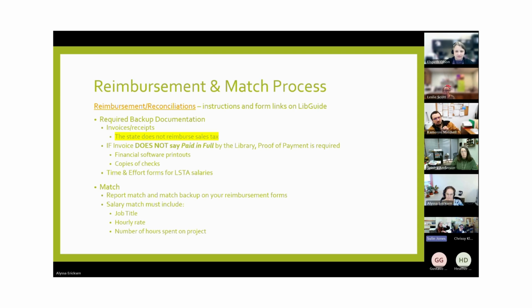As long as your intent is the same, your object is pretty much the same, right? We do have some issues though if that category changes more than 10% because that's changing the contract. You're contractually allowed to buy $5,000 in the supplies and materials category. You have a lot of wiggle room within there, but not if it goes over 10%. So yeah, it's fine. Unless the tariffs are gonna blow your budget out of the water, then we have to figure out ways to fix things.